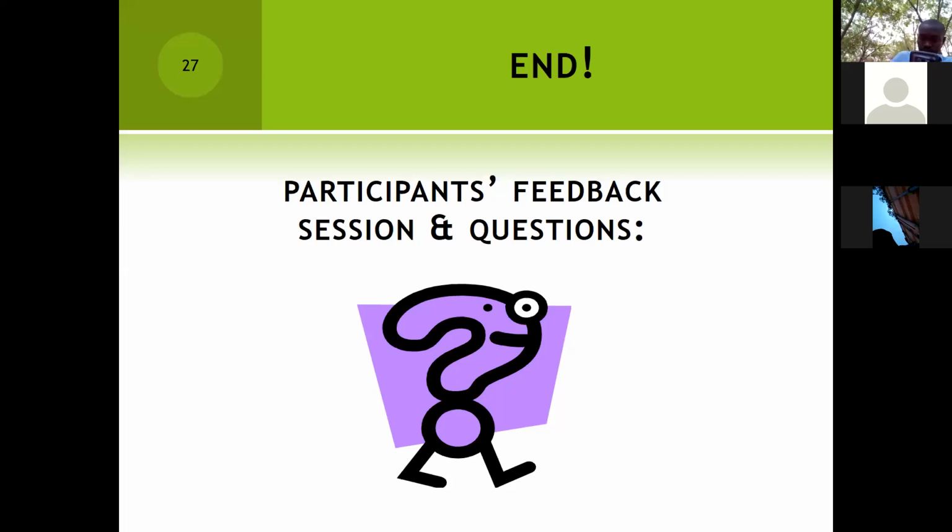But when it comes to evaluation, it doesn't mean that it can't be done internally, but rather the reason it is recommended that it's done externally is for objectivity, because we don't want the evaluation to be subjective. That is for us to actually determine that the project has been successful.